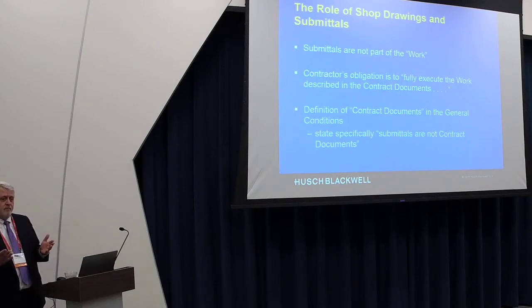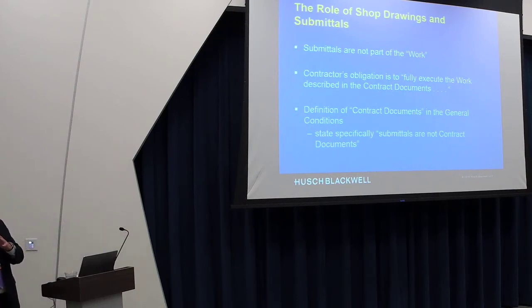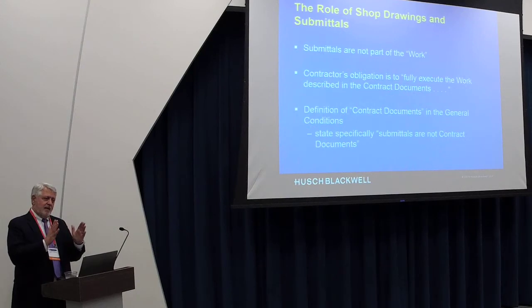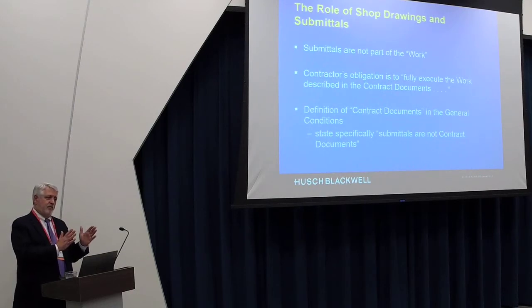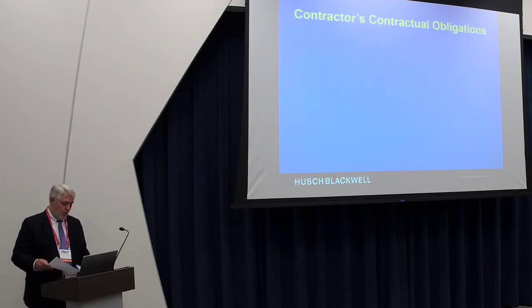So why is that important? Why do we care that that's what it says? When a contractor signs an agreement with the owner to perform the work, that's his obligation. His obligation isn't set out in the submittals and the shop drawings that are sent along as the project goes forward. So you've got to keep in your mind as you're analyzing this and going through the project, don't get hung up thinking, well, if that's what you submitted, that's what the work is, because it isn't. You have to continually go back to the design and, from a legal perspective, keep it on the straight and narrow and make sure that they're doing what the work is.